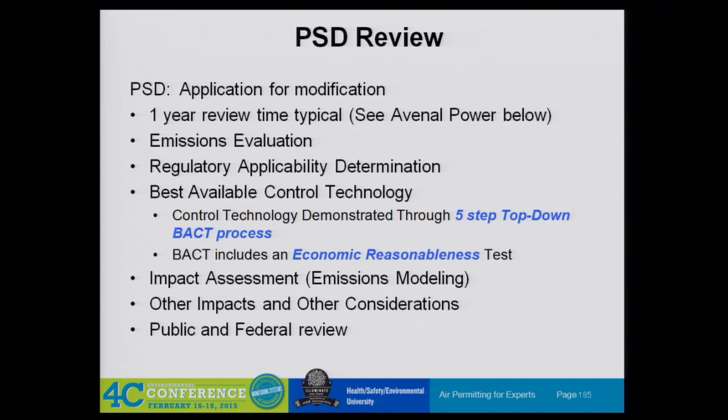Part of that is administrative steps that they have to do, their own clearance. It's getting worse all the time because every agency is in fear of lawsuits from outside parties, so they try to make their analysis and their statement of basis for the permit as bulletproof as they can, because they know that as slow as they are, it's going to be even slower if the lawyers get involved and you have hearings and responses to comments and all that kind of stuff going on. It can drag out even longer.